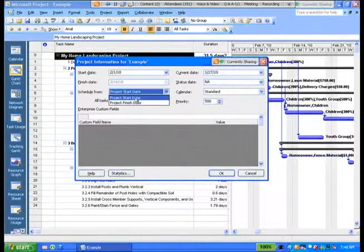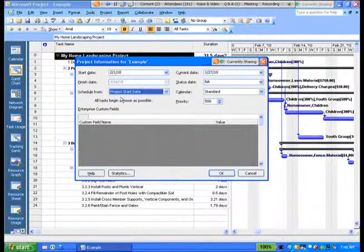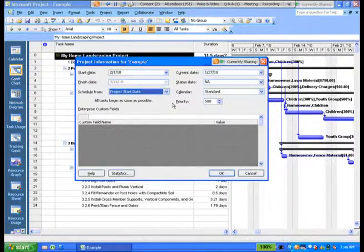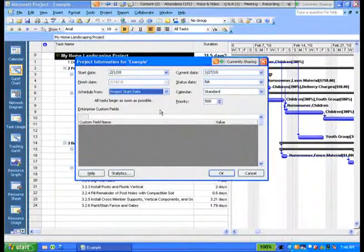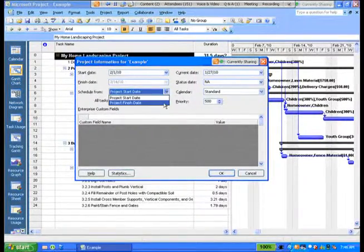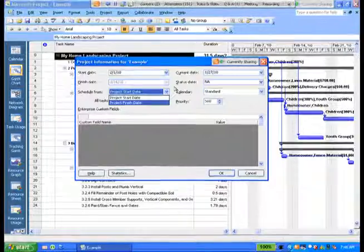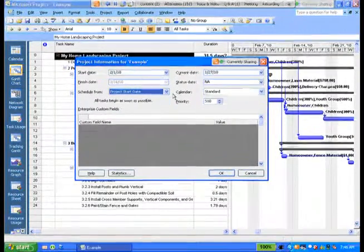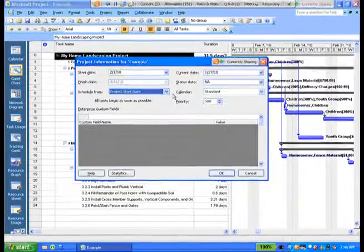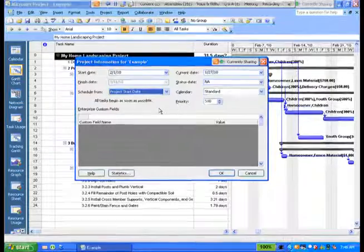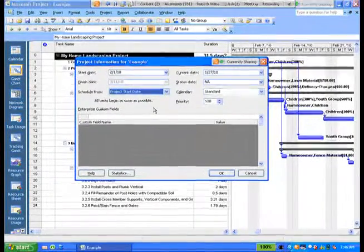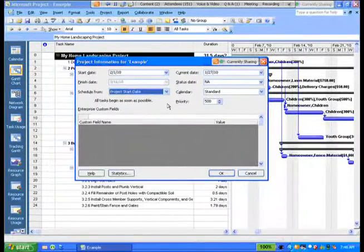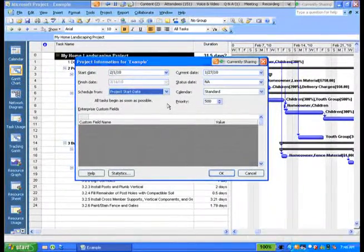Best practice, especially if we're early in our usage of this tool, use the project start date as your launch point. In aeronautics and space, they quite often use the finish date and calculating from the finish date so that they know the latest date so that they can establish tasks in order to make their launches or to make their tests on the airframes. Some call it drop dead scheduling. I call it as late as possible and not necessarily a good thing when we're trying to be efficient.